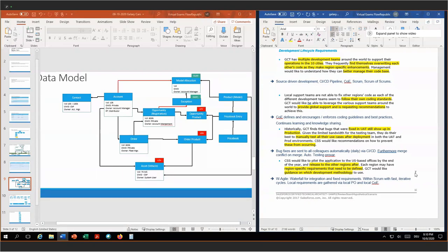Within the region-specific packages, we should define clear boundaries. On top of that, we should use custom settings, custom metadata, record types, page layouts, as well as permission sets and permission set groups as much as possible, to have a clean separation of concerns within our code and to make extensibility and adoptability the highest priorities. For the project management itself, we will use vAgile — waterfall for the integration adoptions we have to do and for fixed requirements. Within that, we will use Scrum with two-week sprints. Local requirements are gathered not only via local product owners and the local Center of Excellence, but also with the local management team and local power user team.